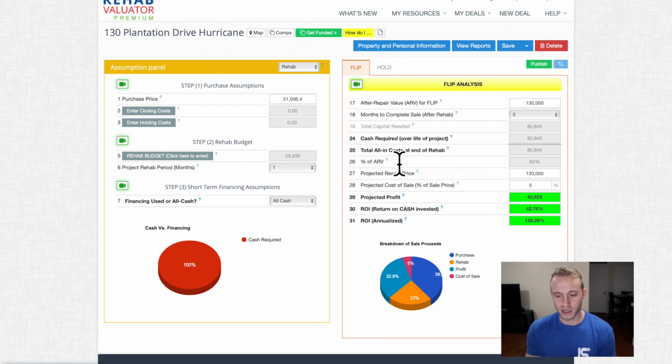All right, so months to complete sales, the next line, we always put 3. That's from the time that the project's finished, not the entire length of the project from the purchase, but from when the project is ready to go on the market. We always give it 3 months. Your area might be different. If you're in a really hot market, you might be able to get away with 1 month. If you're in a slow market, you might need to push that to 6.